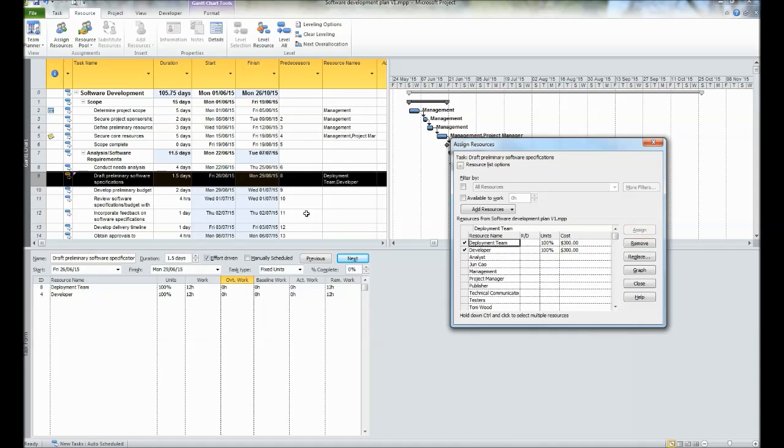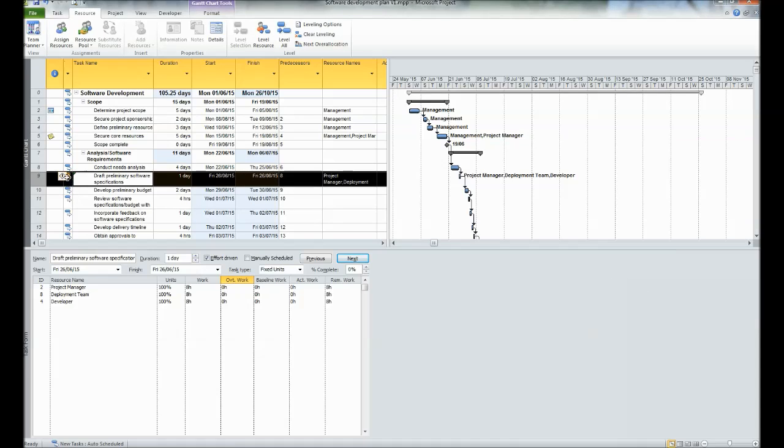If you do that, you can see that the duration of the task is reduced to 1.5 days. Similarly, I'll add one project manager to the same task. See, again it's reduced to 1 day, but practically it may not be possible. But this option is there if you want to use it, and this will do things for you.